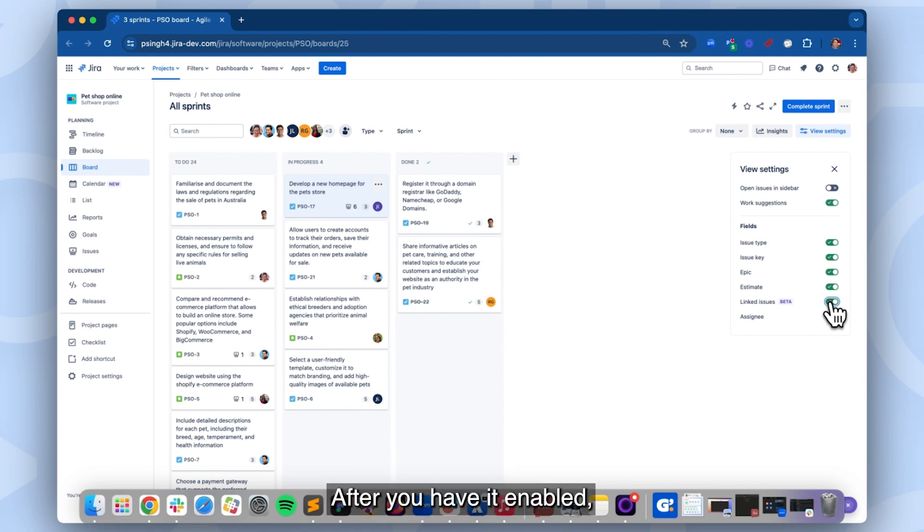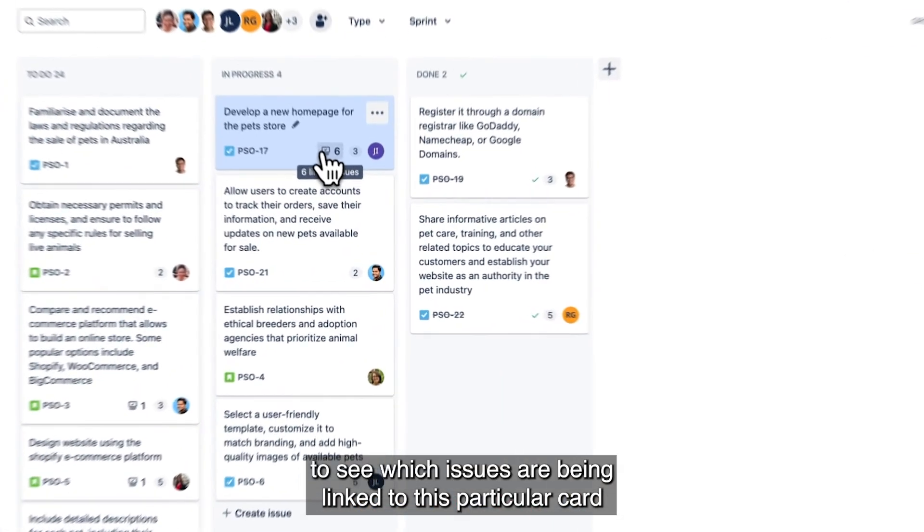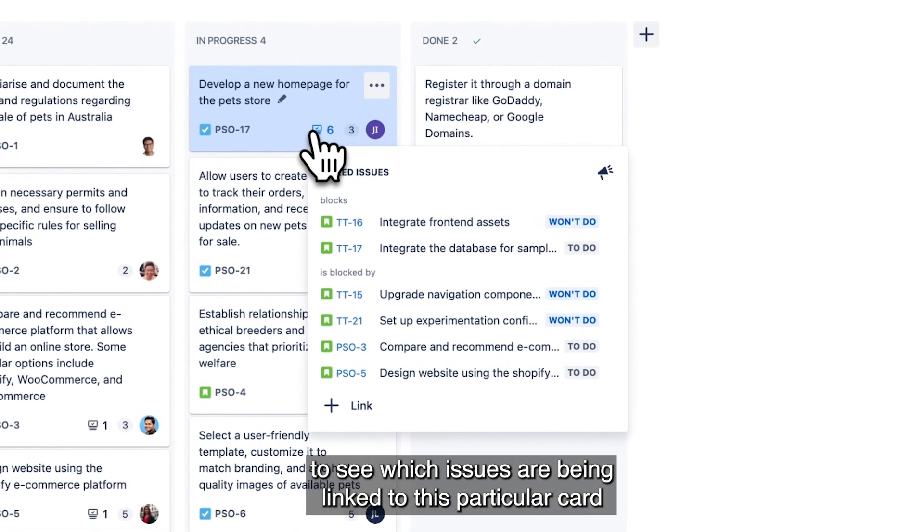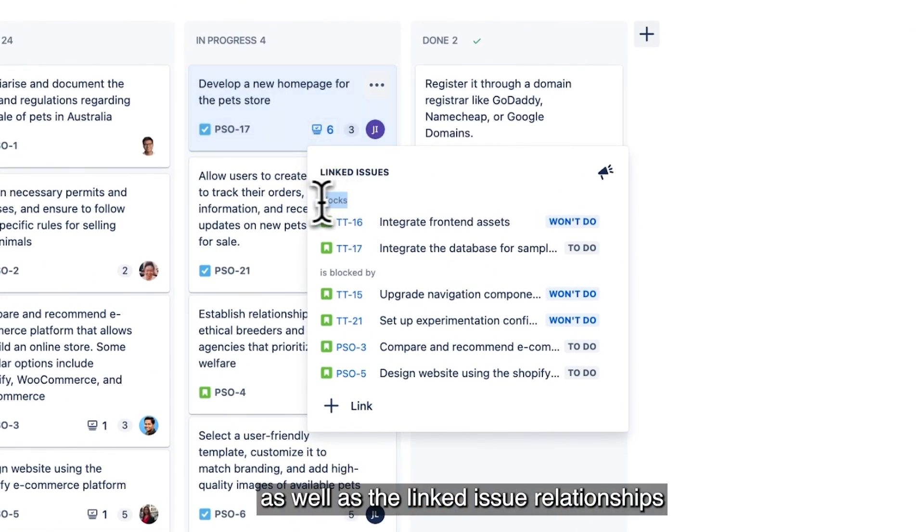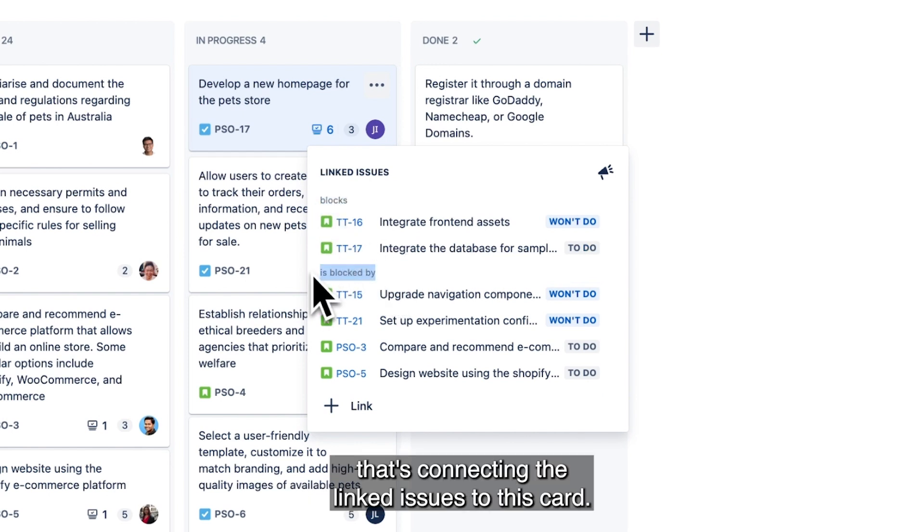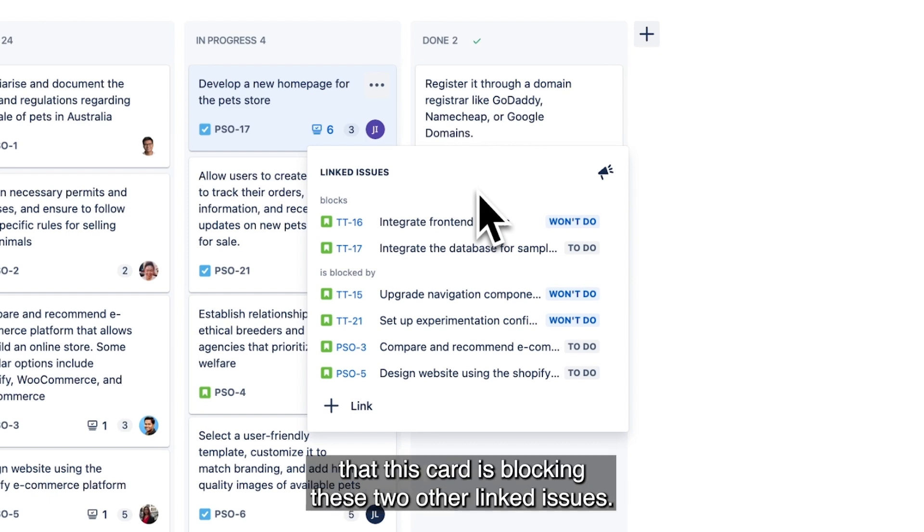After you have it enabled, you can click on the linked issues icon to see which issues are being linked to this particular card, as well as the link issue relationships that's connecting the linked issues to this card. In this case, we can see that this card is blocking these two other linked issues.